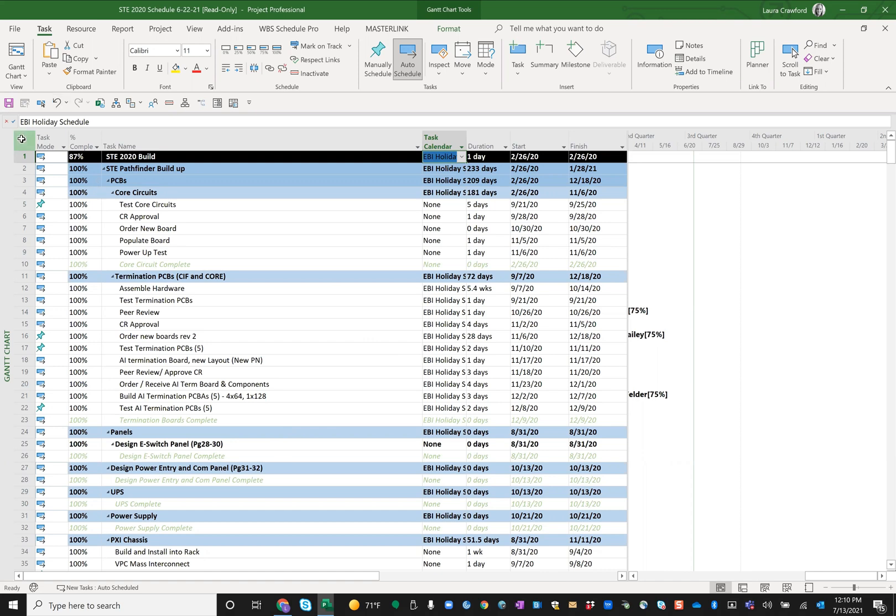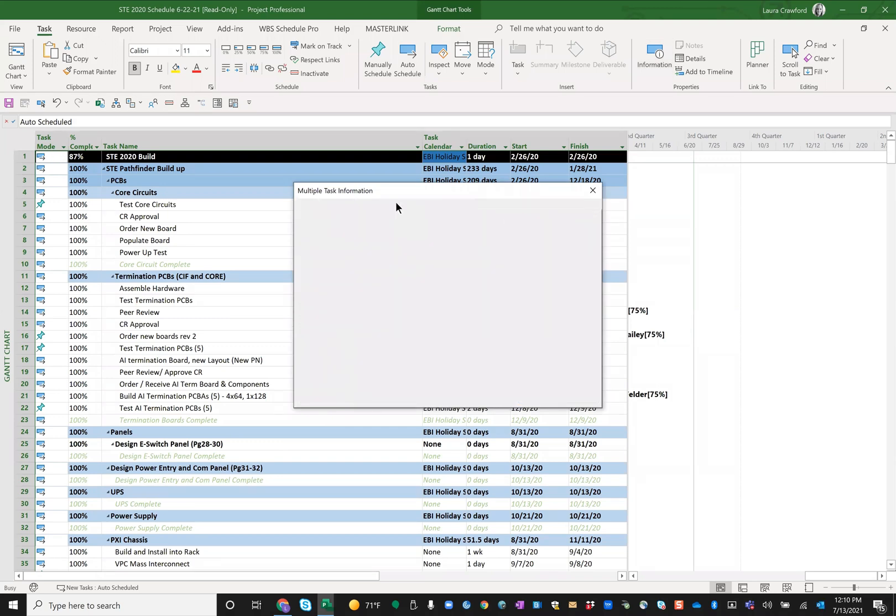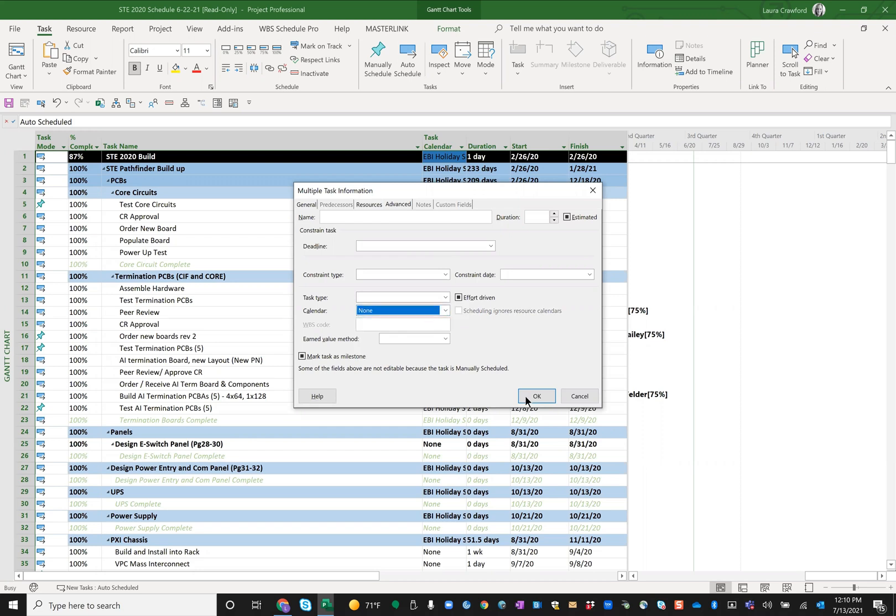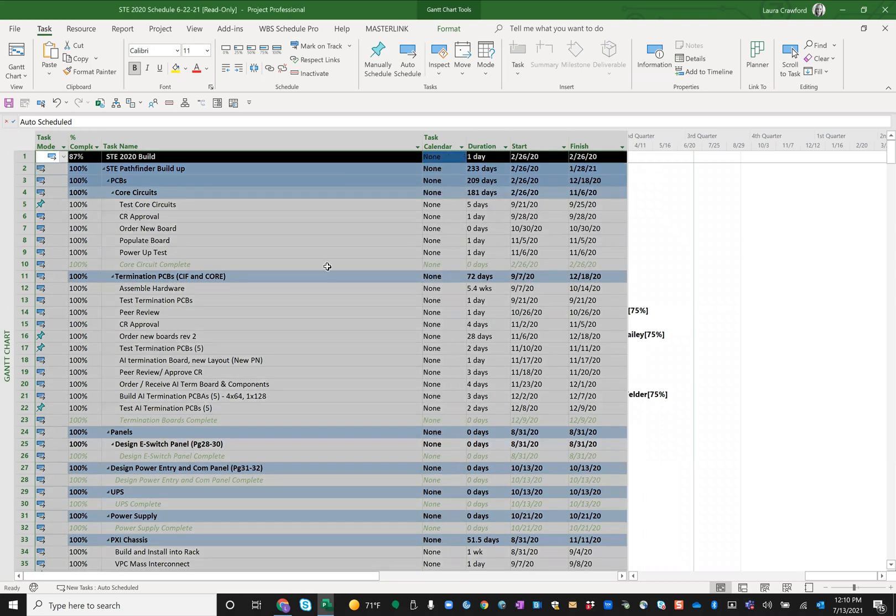So what I did is I came in here, I highlighted all my tasks from my task ribbon, I went to my information dialogue box, I went to the advanced tab, I grabbed the calendar icon, switched it to none, clicked okay, and got rid of those calendars.